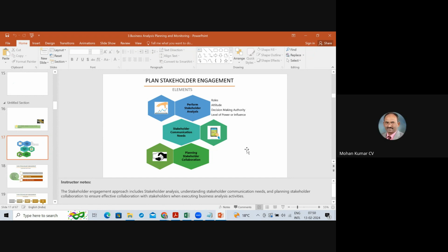I told you internal influence is your time pressures, because your cost is important. External influence is what the customer expects, what documents he expects, what type of documentation they want. So what we generally do is before we actually start the project, we go to the customer and tell them these are the templates I am going to use. Please validate my template first before I even deliver it. So that I can mitigate that external influence problem. Otherwise, at the last minute you have prepared all the documents, and if somebody says your template is bad, I want to change the template, what do you do?